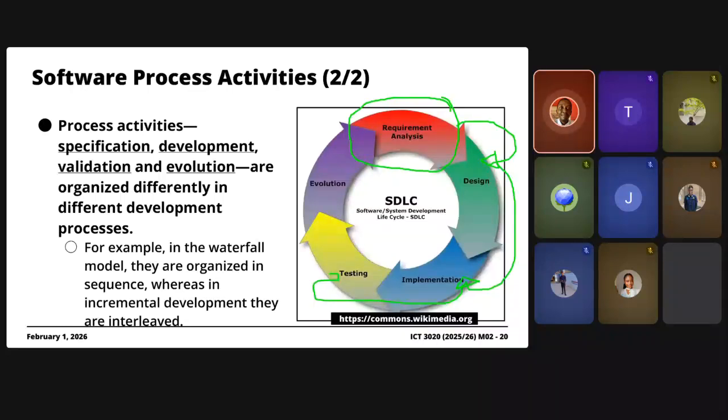So that if they come back and claim that the thing that you've built does not include the requirements, you go back to the document that was signed off. Say, but listen, we agreed that this is what we would implement. If you look at the software, all of these features that were captured have actually been implemented. Now, in terms of giving a chance, they could, but obviously that has cost implications. So you again have to agree with the client.